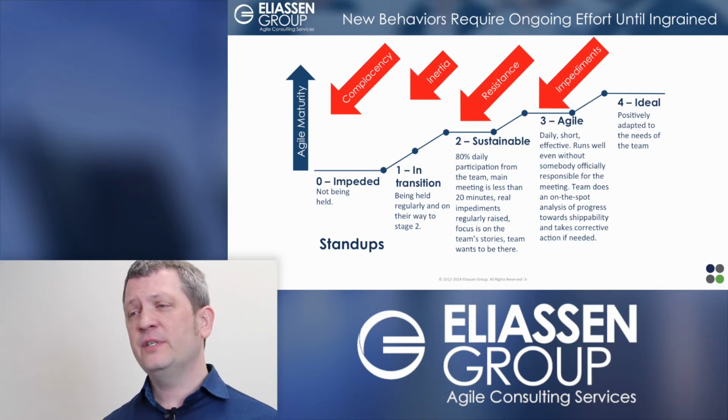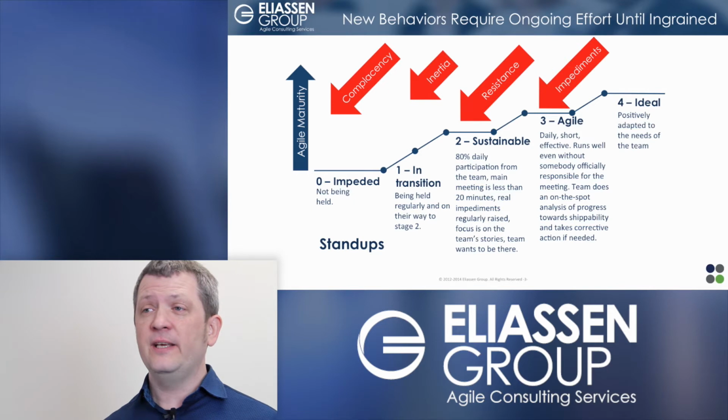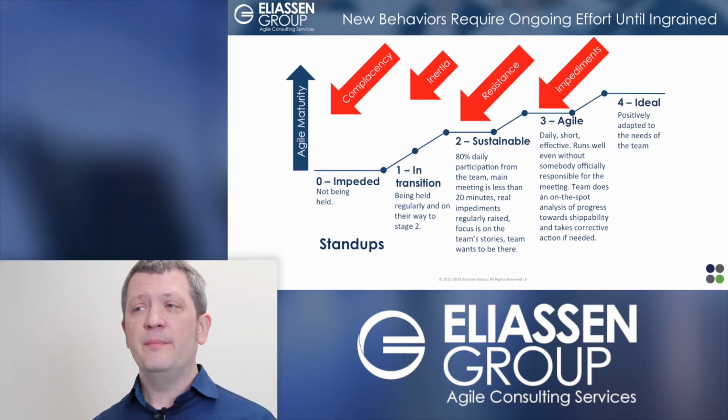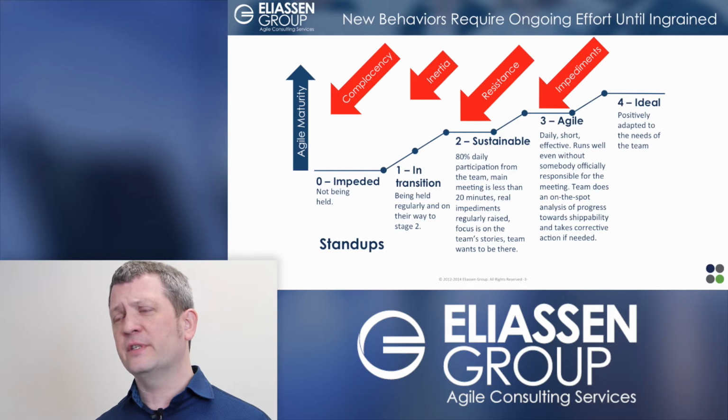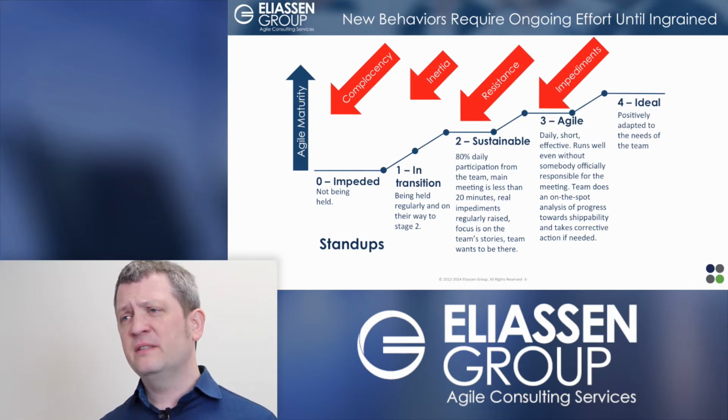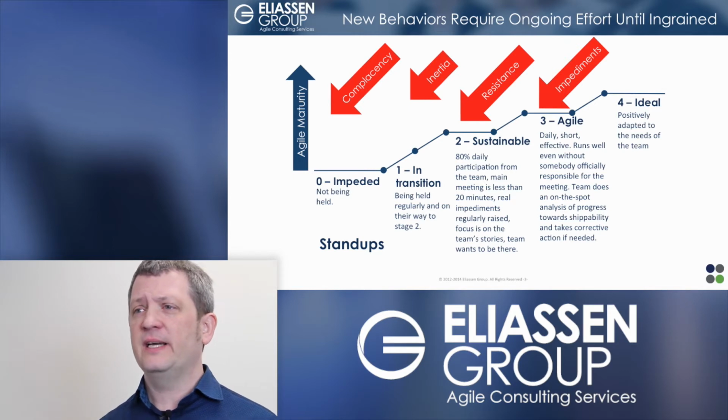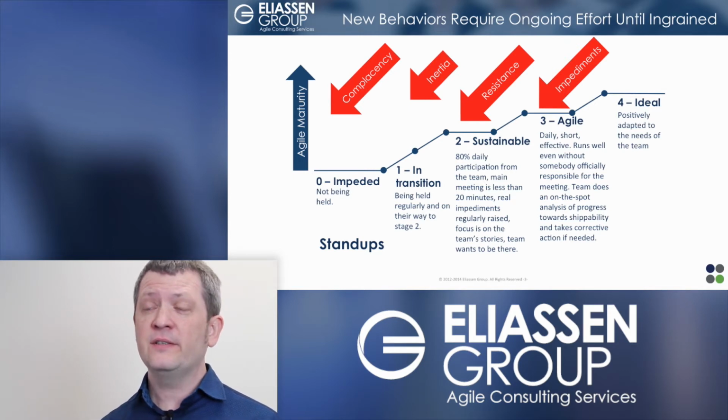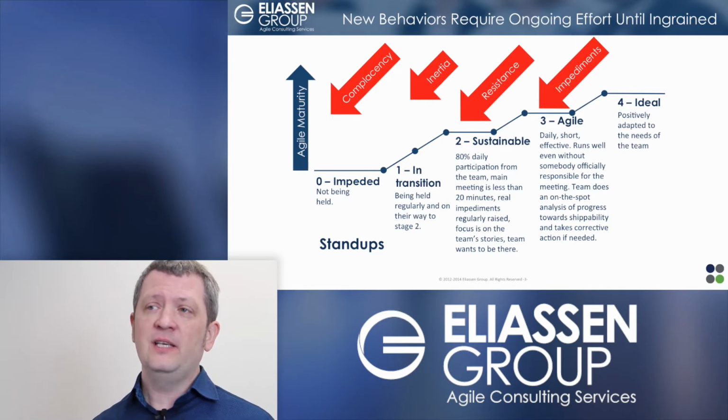It means that 80% of the folks on that team are participating daily. The main meeting of the stand-up, and for that I mean the typical 3 questions, is 20 minutes or less. Maybe there are side conversations after that. 15 minutes, sure, that's the goal. But you know what? If it's 20 minutes or less, that's fantastic. Real impediments are being raised. The focus is on the team's stories, and the team wants to be there.